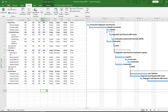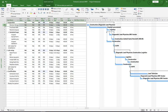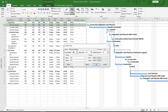Now we're going to update some tasks. Go to the Task tab and click into Task 2, 'Review Design'. In the Task tab under Schedule, click the down arrow on Mark on Track and choose Update Task. The Update Task dialog box opens. The task is complete and ran as it should, so enter one day for actual duration and zero days for remaining. It started on time so the actual dates are fine. Click OK.